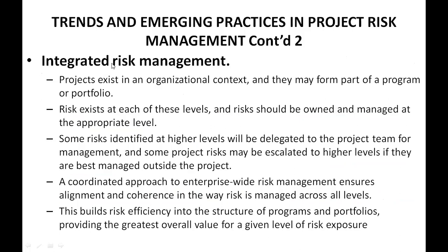Now, another trend that we need to consider is integrated risk management. Project risk exists in an organizational context and may form part of a program or a portfolio. Risk exists at each of these levels, and risks should be owned and managed at the appropriate levels. Some risk identified at higher levels will be delegated to the project team for management. And some project risks may be escalated to higher levels if they are best managed outside the project. A coordinated approach to enterprise-wide risk management ensures alignment and coherence in the way risk is managed across all levels. This builds risk efficiency into the structure of programs and portfolios, providing the greatest overall value for a given level of risk exposure.